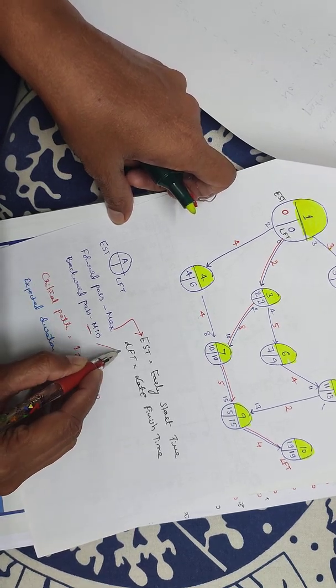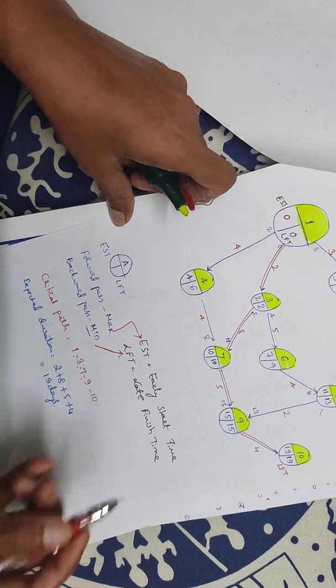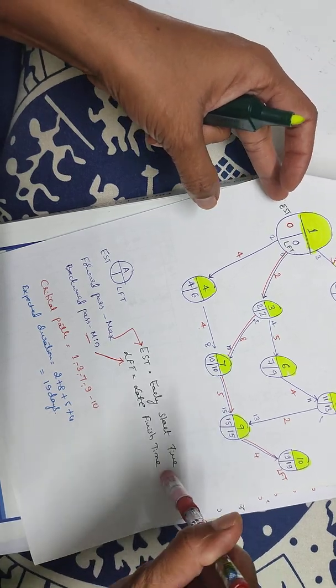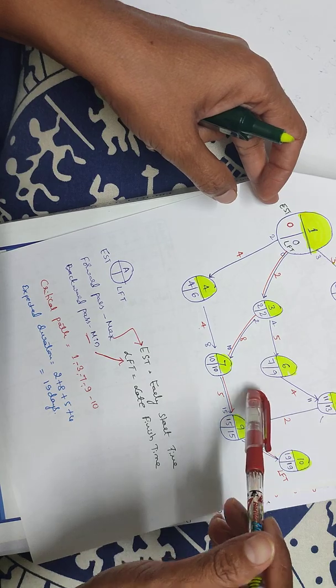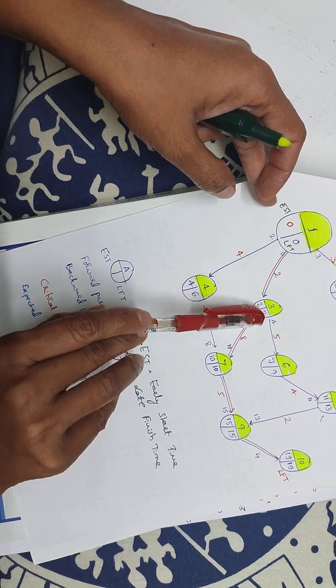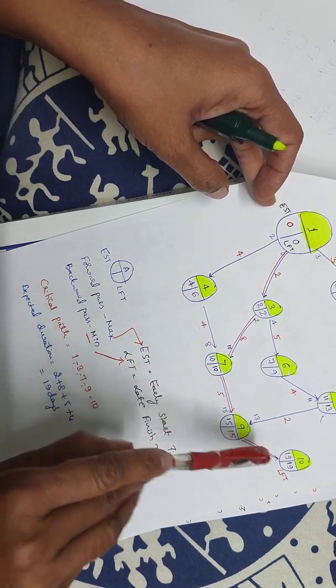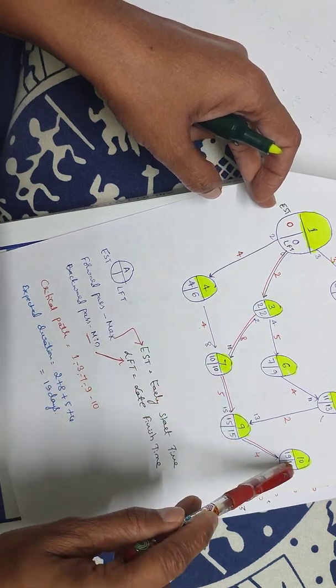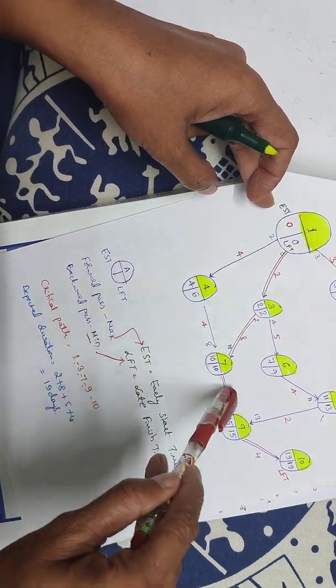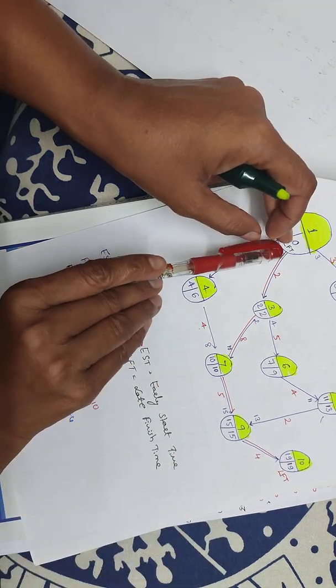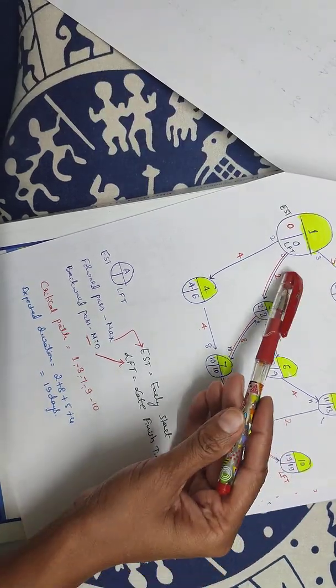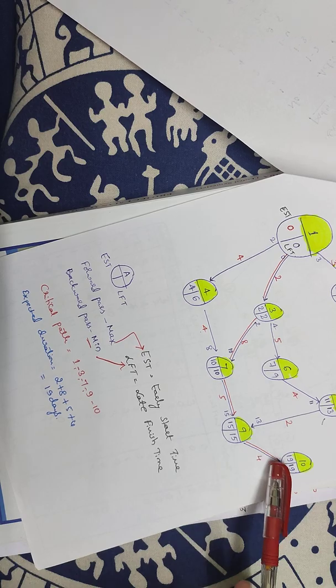Backward pass uses minimum value of late finish time. This is early start time and late finish time for the same activity. That is the critical path method. Where 0, 0; 2, 2; 10, 10; 15, 15; 19, 19. We consider this as the critical path where late finish time and early start time are the same, meaning the difference equals zero.